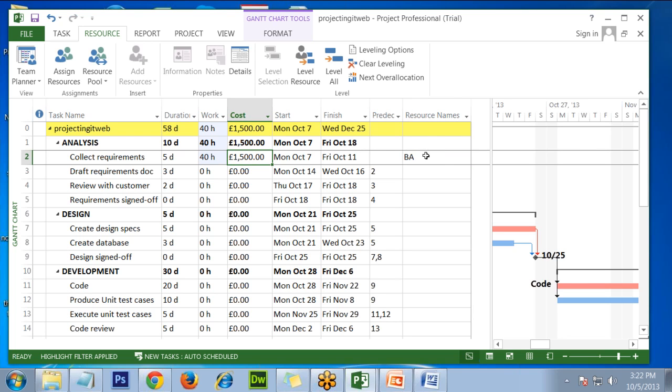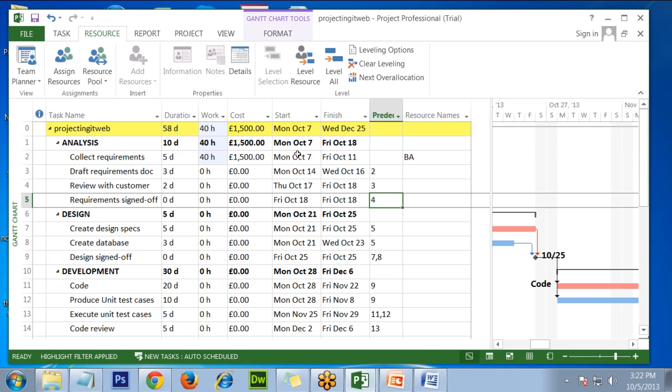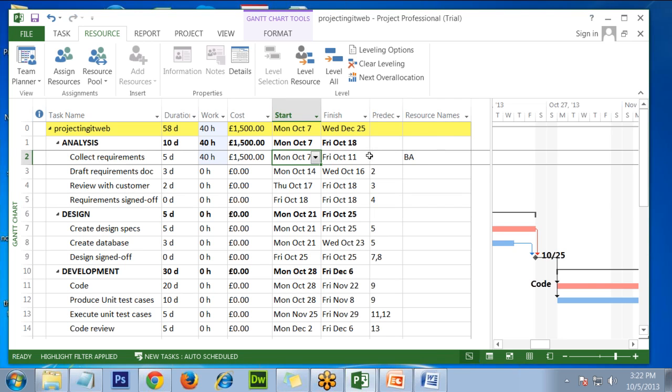What Microsoft does is it goes and checks how long this person is available. Then it also checks the cost of the person and then it assigns resource and calculates efforts and cost. When assigning a resource and calculating these dates, Microsoft uses availability of the business analyst.